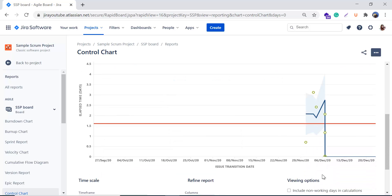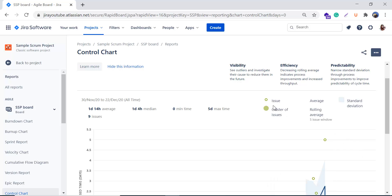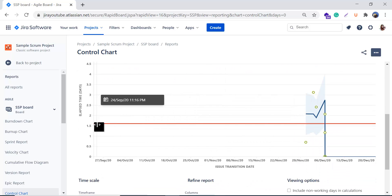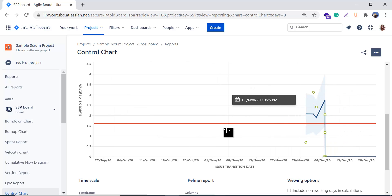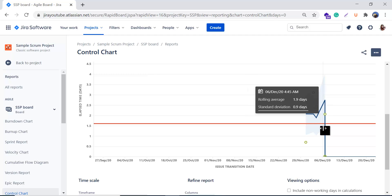On the chart, the x-axis shows the date and the y-axis shows the time. A single gray-green circle represents individual issues, and a cluster of circles represents a group of issues. The shaded blue area represents the standard deviations. The red line represents the average time, and the blue line represents the rolling average time.